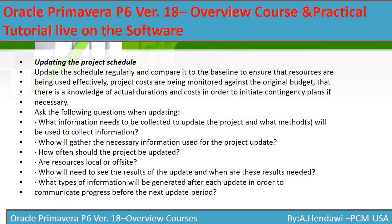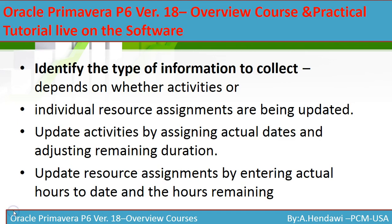You have to understand updating project schedules. You have to set up a system — how you will collect the information, who is responsible for that, how you get all this kind of template, what information you need. Do you need only the dates, the units, the hours? Who is going to give you this information? You have to build this system so that it's easy when you collect the information from the guys on site, because this is the most struggling part — how you get the information in the right format to help you update your schedule.